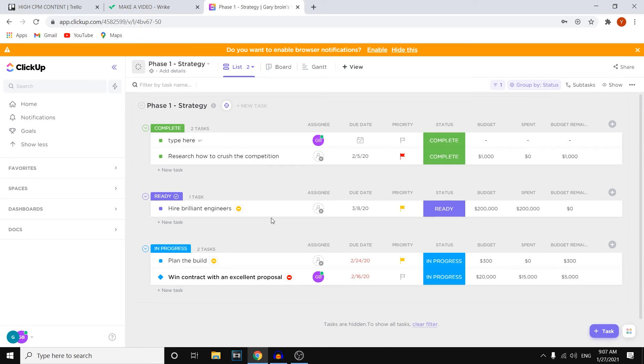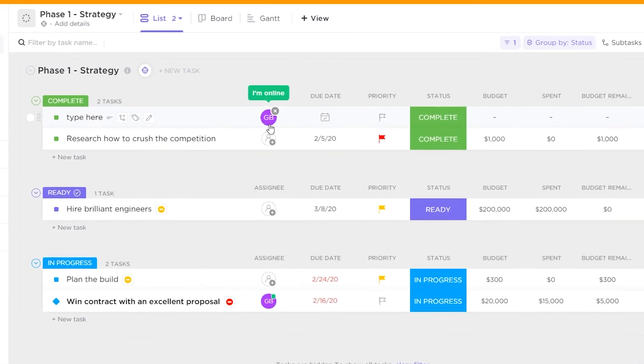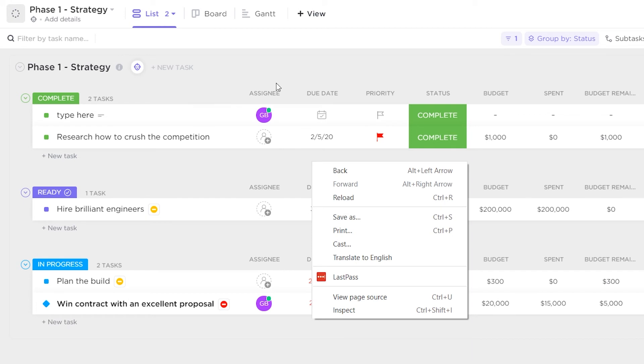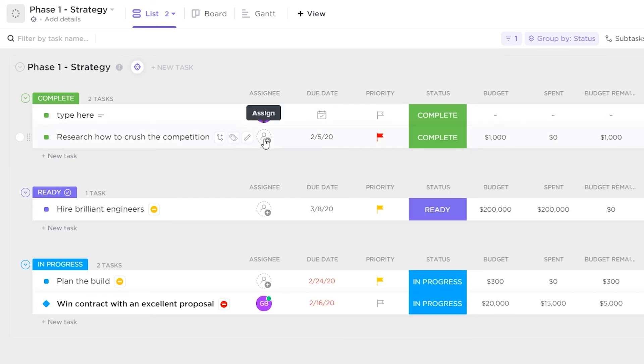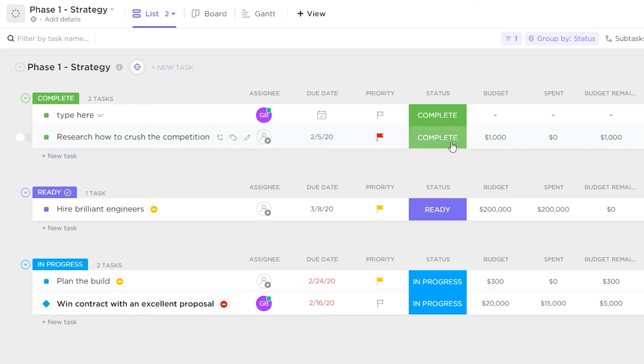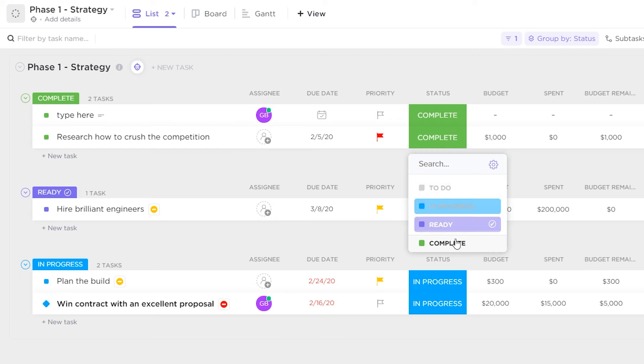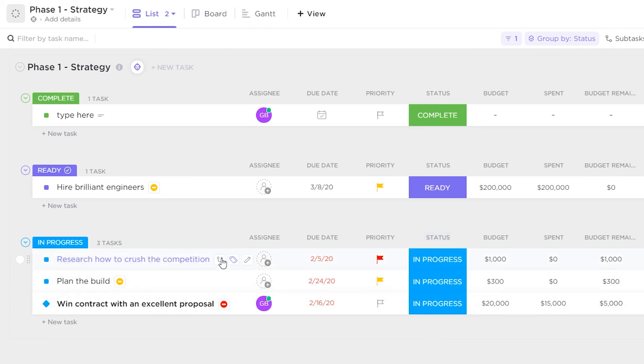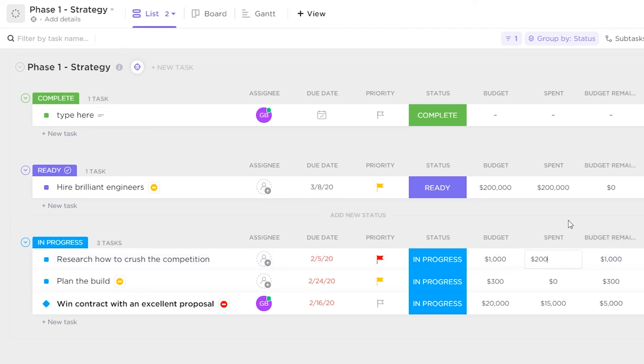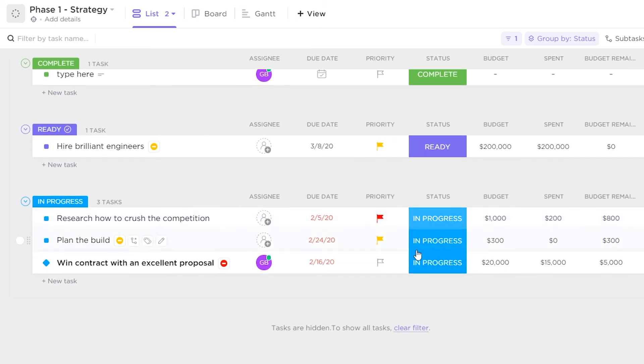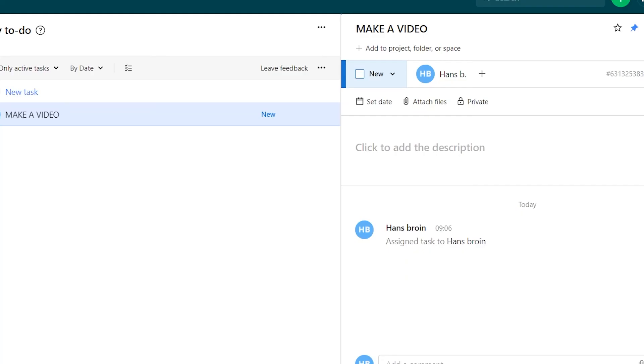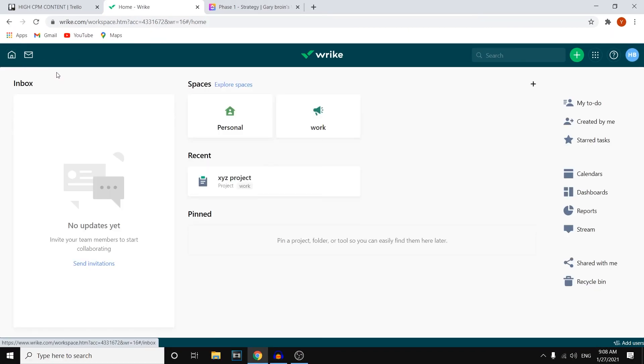Now, if we compare that to ClickUp, this is way better for project management in my opinion, because you can see that the overview is just great. You can simply add a task right there. You can then assign people so you can add people from your team into this board on ClickUp. You can add them to it so that they know they need to do it. You can add dates, you can add a priority if that's needed, you can add a status. So let's say that it's complete, you would mark it as complete. Let's say it's in progress, they can mark it as in progress and it will move over here so that the manager, whoever that may be, will know what the status is on all of these specific tasks, which is great. You can add budgets, you can track how much money you've spent so far, and then you also see the budget remaining. So if let's say I spent 200 bucks already and the budget is 1000, you can see that the budget remaining would automatically switch to 800. And that's really cool because most of this will be automated. And in my opinion, ClickUp is definitely better than Wrike, especially for project management.